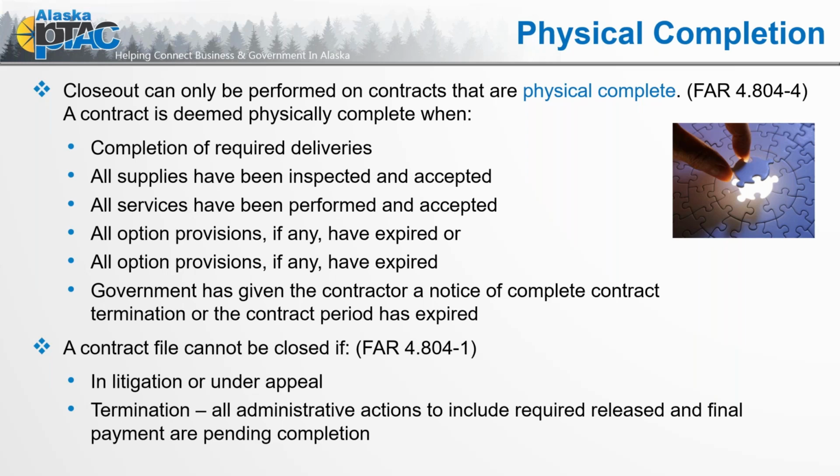If you're ever looking at these slides down the road, you have that information. Hopefully none of us ever have to face a termination for cause, but we all must be aware of it as part of that government contracting world. Termination for convenience is just that. That is one of the government directives. If they're no longer in need of that facility, service, or those supplies, or the process has changed, the government can always terminate for convenience. But that's a whole other workshop for another time.